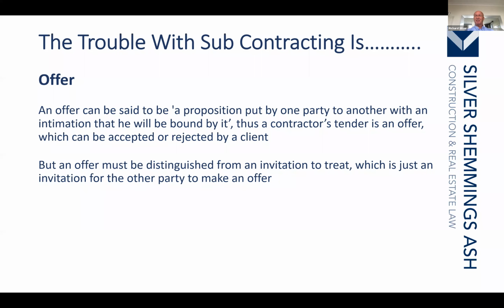Most likely what the subcontractor says is our price is £1 million based upon our terms and conditions. So they haven't even priced it based upon the invitation to tender. Now, the invitation for tender has no relevance because it is not an offer. It is the subcontractor's tender that is the offer, and which, if accepted, will create the contract. And the key point therefore will be that it will be the subcontractor's terms and conditions.